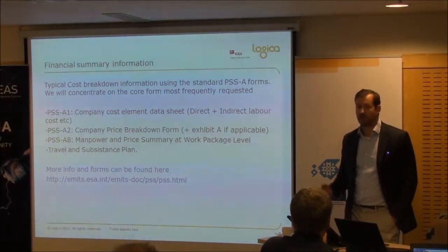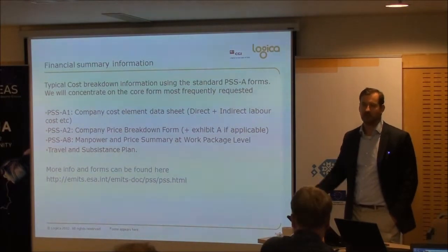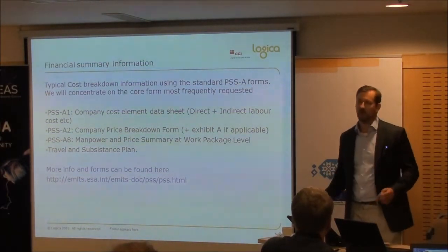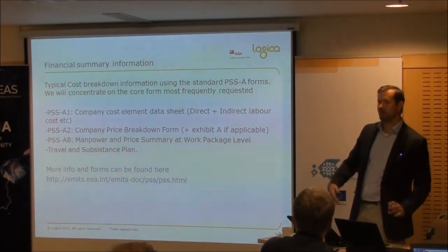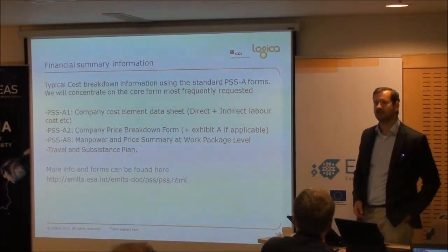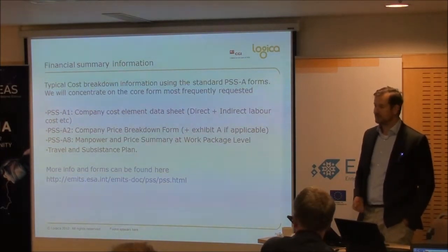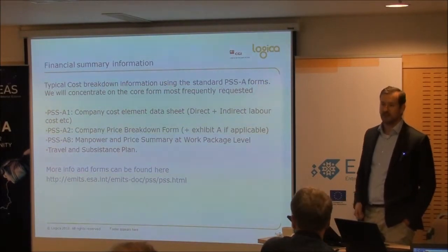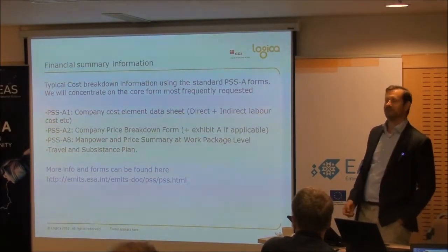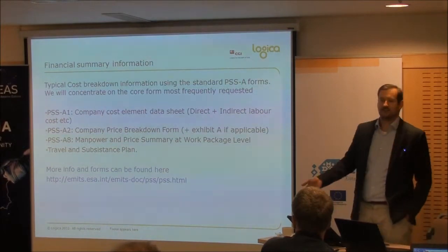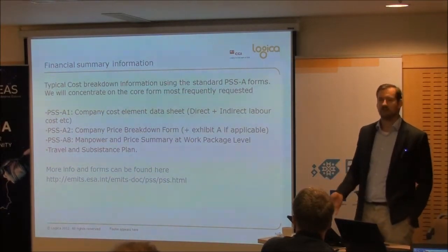This will give them a view of how much each part of the project is costing. And they typically have rules for where it should be, more or less, as an overall percentage. For example, if this is a project and you've got 5 subcontractors, and overall you've stated they've got 5% for management, good luck. It's not justifiable. You're never going to do it. So you need to look at those.